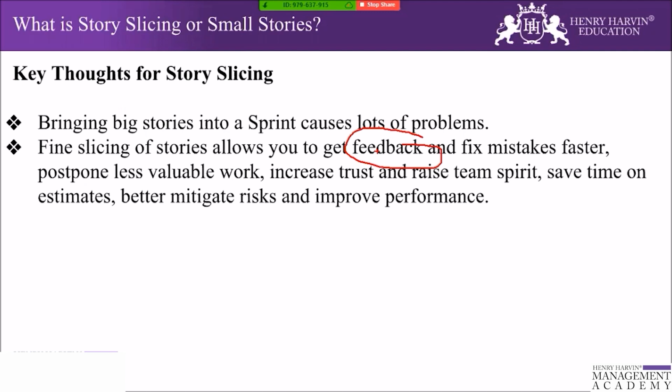Your team has a capacity like a drain pipe, and just like a pipe, the larger the object you try to push through it, the more likely it is that blockage and bottleneck will occur. Perhaps one person who is tied up in a large story is also the only person who can complete a key piece of another story. So it is better to have small stories.